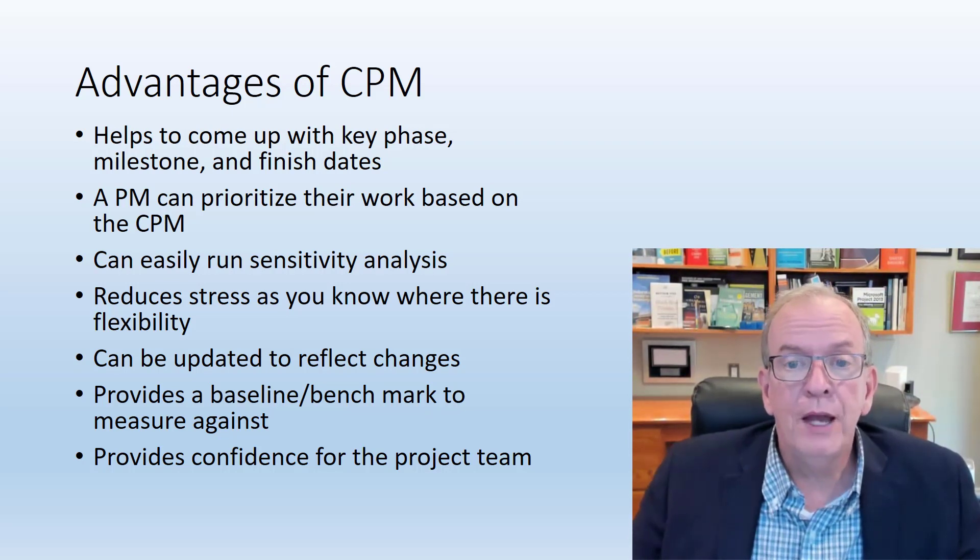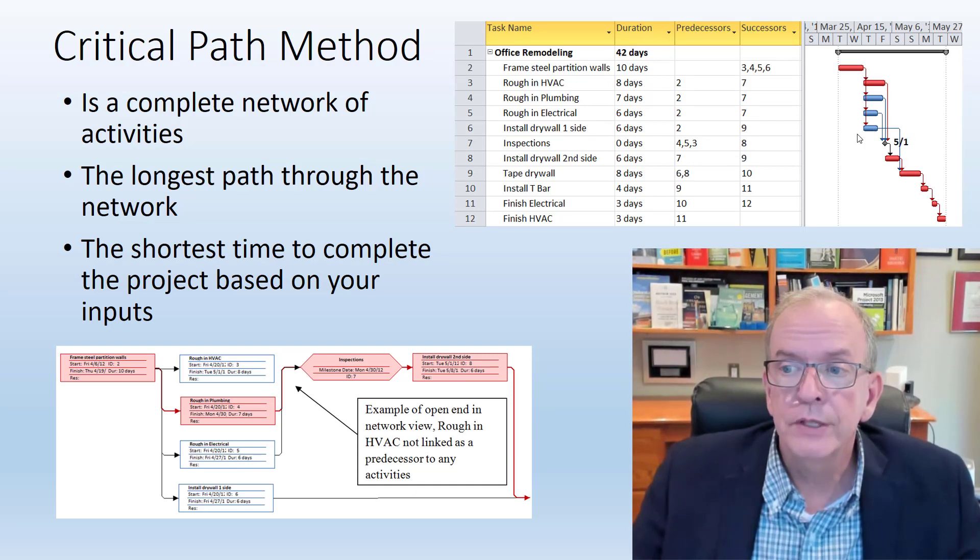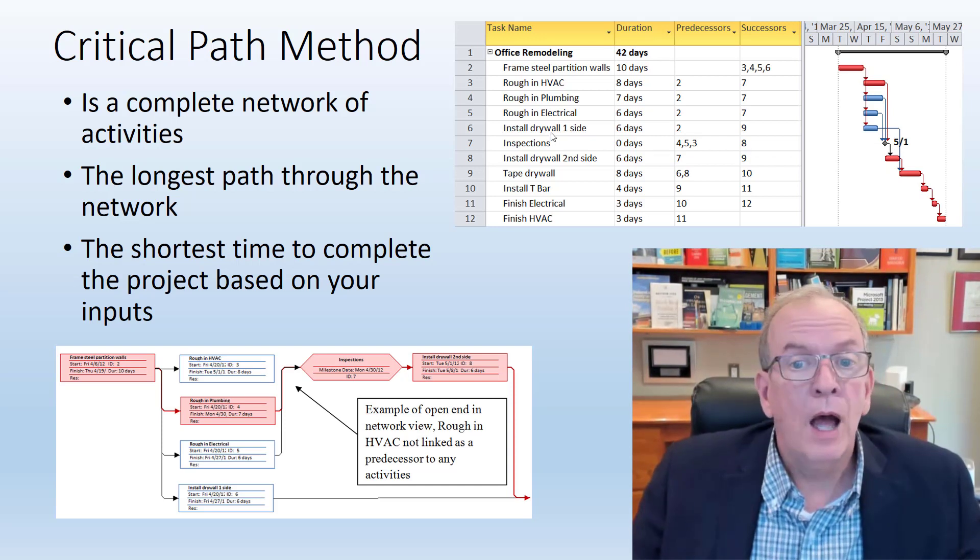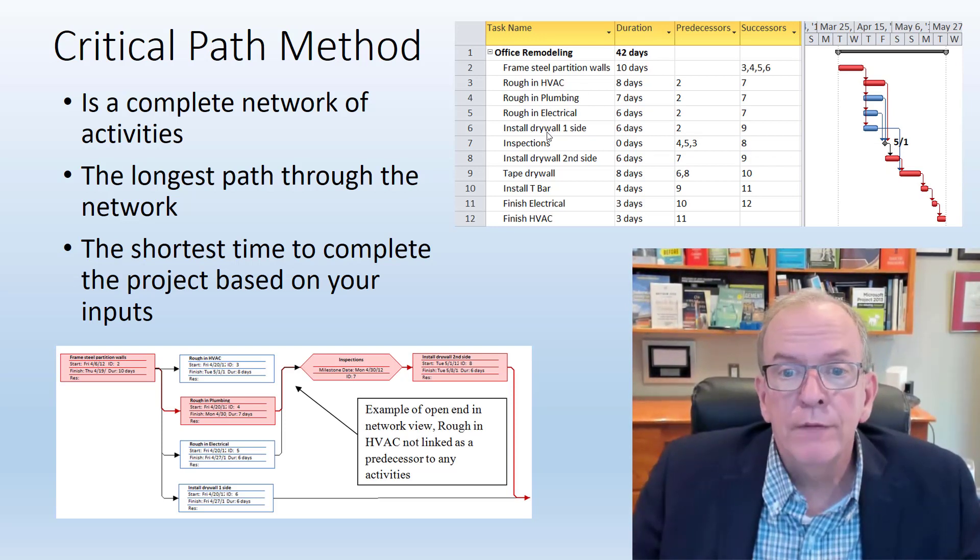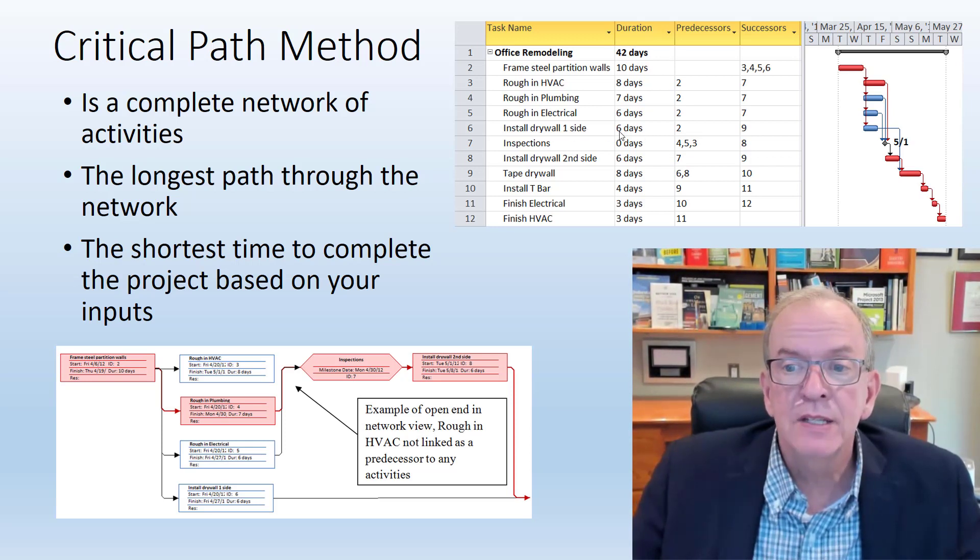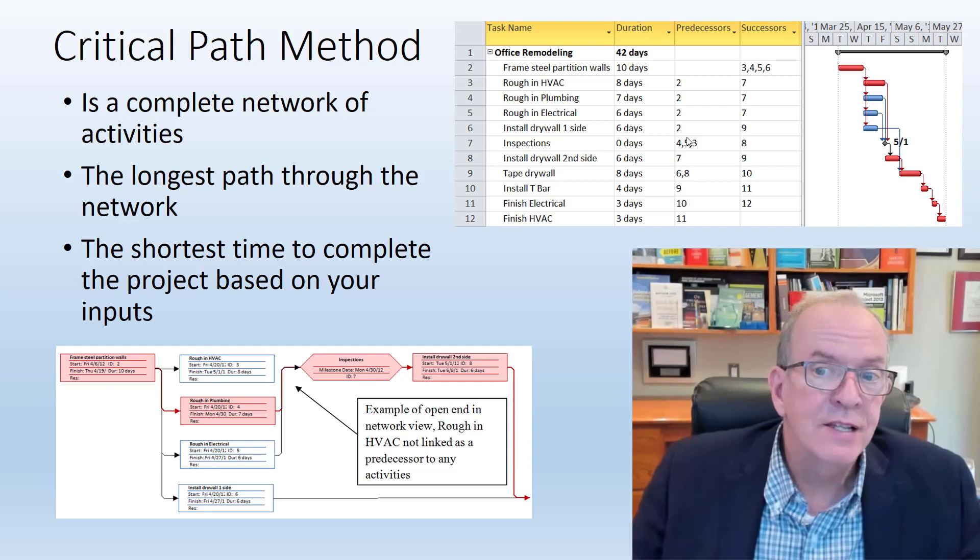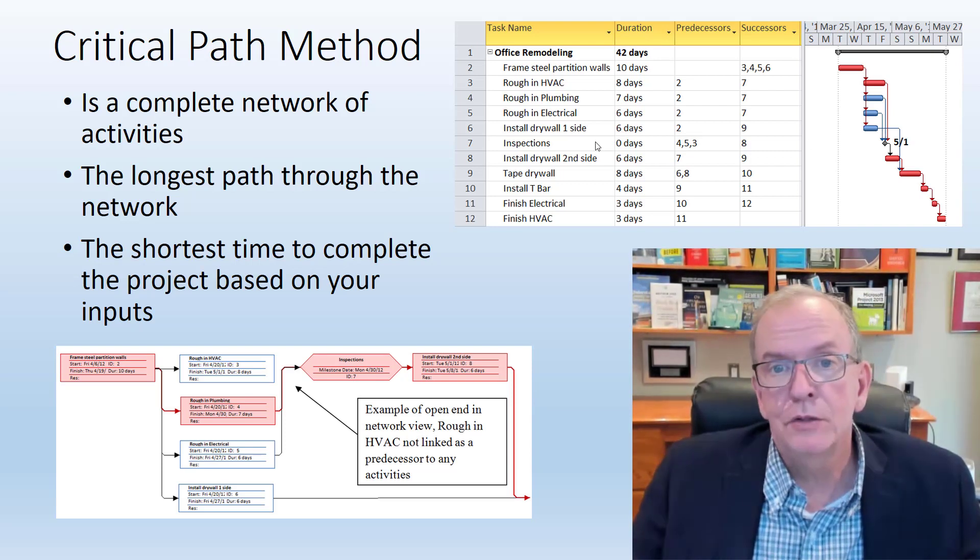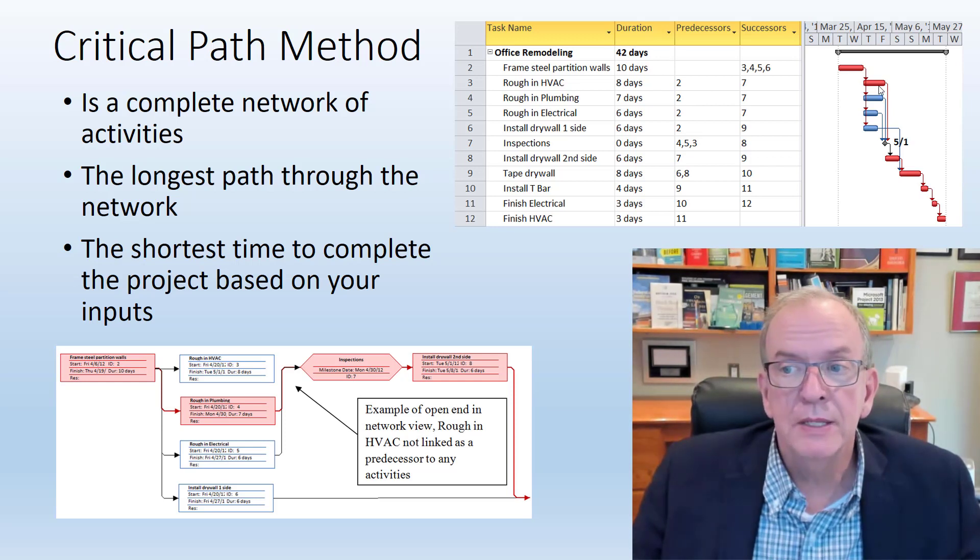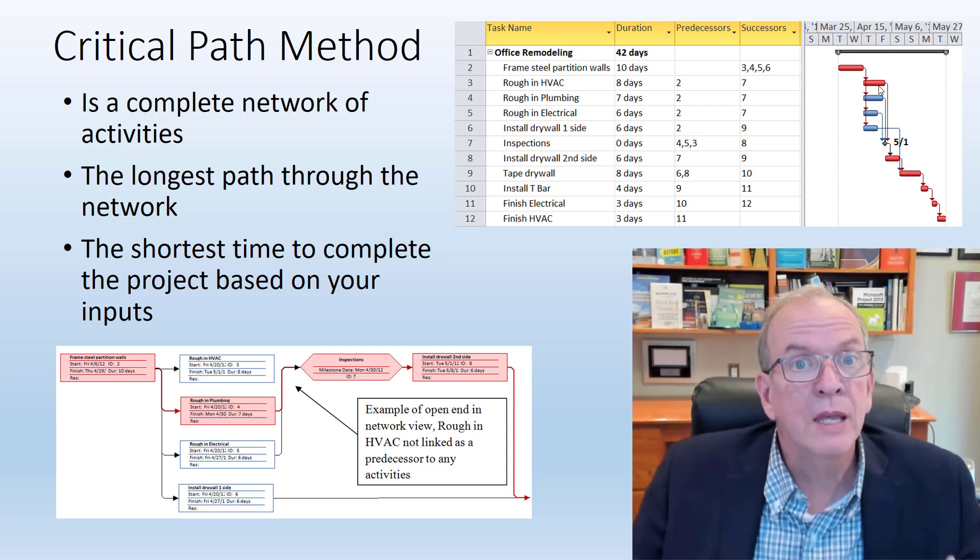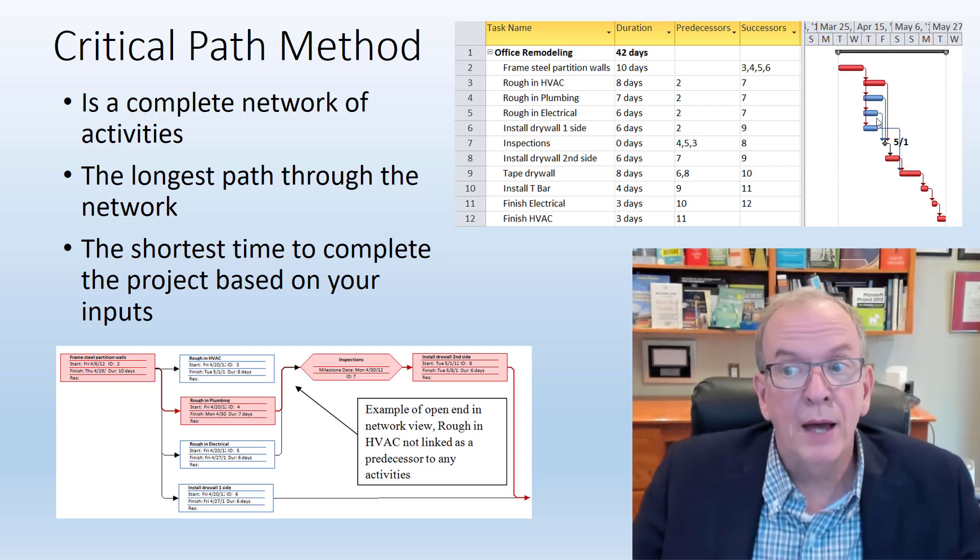You can prioritize your work based on the CPM. If I have something that has a relatively fair amount of slope, which installed drywall first side would have quite a few days of float, I can prioritize other things. So if my drywall sub came up to me and said this is going to take 10 days instead of six days, and if I had 10 days of float on this activity, then I wouldn't be sweating it too much.